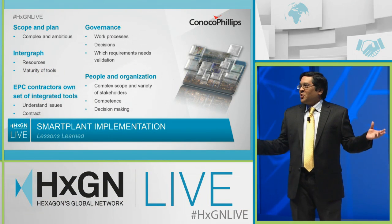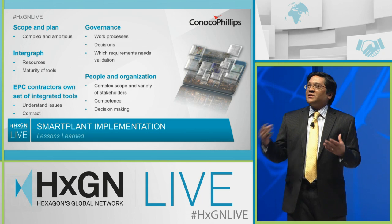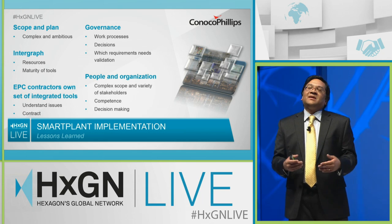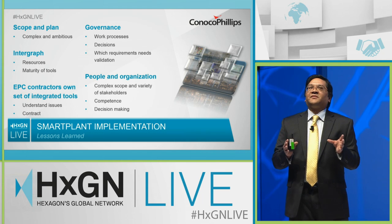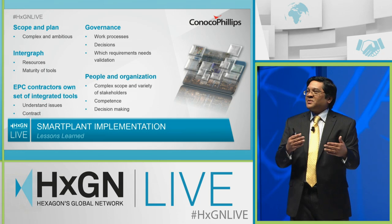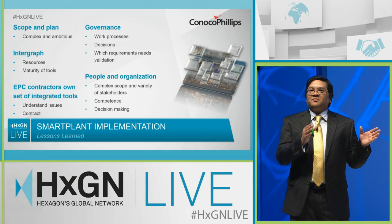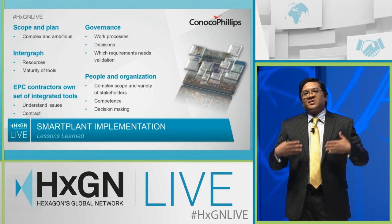We had a very ambitious scope and a very ambitious plan. And we essentially tried to do everything at one time to integrate all of these data sets across all of the functions on three projects that were in progress. So we ended up with a lot of false starts and a lot of wasted effort when it became obvious that we had bitten off more than we could chew, right? So the first lesson is you have to do this in a methodical way. Put it in small, easily managed scopes that build on one another and bring the organization along with you.